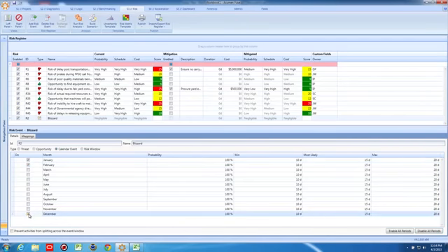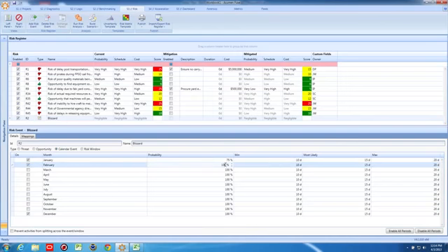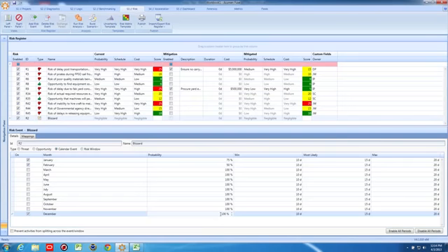First, we'll select the months that have a probability of a blizzard. Then, for each month, we can determine the probability of blizzard impact and the potential duration of the impact using a 3-point estimate.